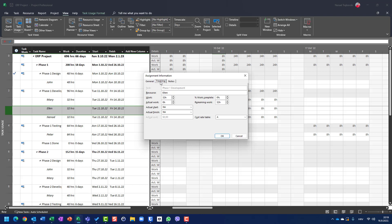In Tracking, I can see Ellen's work. The total work is 32 hours because she is supposed to work four days at eight hours per day with no vacation, so 32 hours. If I put 100%, but don't set an actual start or actual finish, it means she did her work 100%, started on October 11th as planned, and finished on October 14th. So Ellen did her job great.